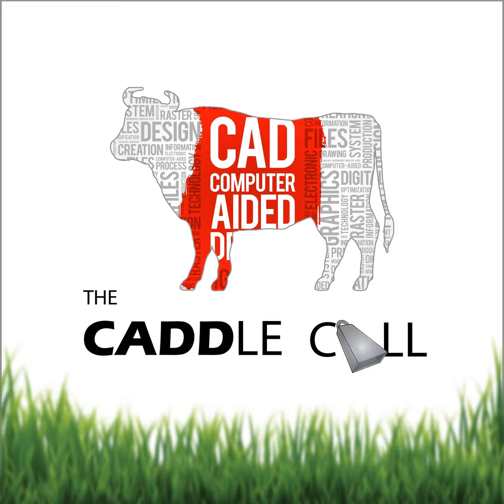But still, having the initial layout already done, even if it's just a line running from a control box to a bell on the wall, that saves you a lot of time and money, right? You can use those lines, easily convert them over to your own standards so they look the way you want with your information. And then just add in the individual pieces and components that you really need, and have the CAD system build your parts list and BOMs and such from that.